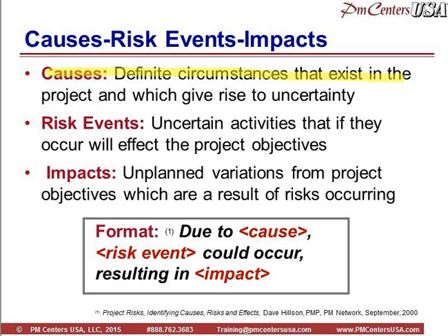It led to risk events. I mean, obviously, one risk event was the Chinese government seizing the plant after it was done and kicking us out. That was a risk event. Another one, quite frankly, was the fact that we were importing some equipment and it may not get out of customs. The Chinese could just hold it in customs and not release it. So we had a significant number of risk events we identified, but when you do risk management, you got to separate causes, which are facts that exist, from the actual risk events. And risk events have uncertainty. They may or may not happen.